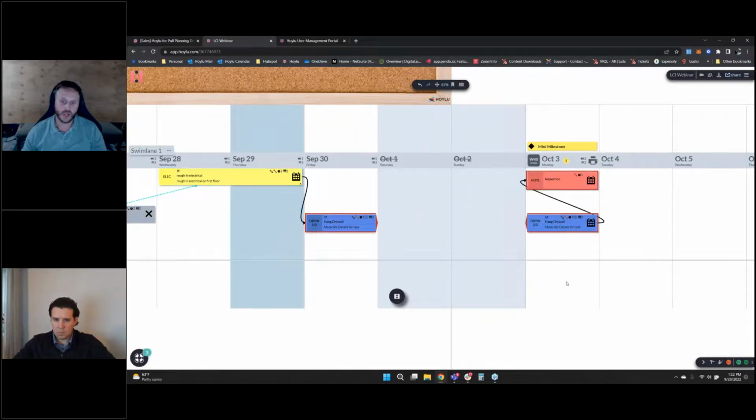And now you'll notice that we have a new potential conflict, because our inspection, let's say it's happening at 7 a.m. on Monday morning, and we can't hang drywall on Monday. So we have to get it done if we want to stay on schedule here. So maybe we make a decision, you know what, sorry, Ryan, your crew is going to have to come in on Saturday, even though it's a non-working day, and finish up and do some overtime.